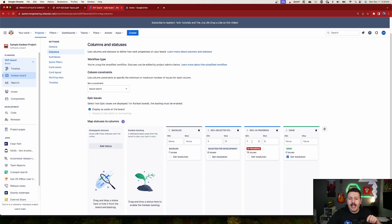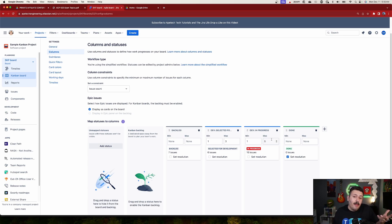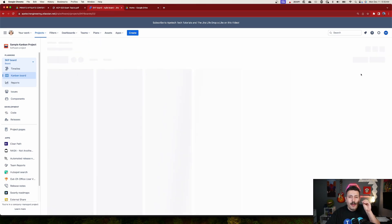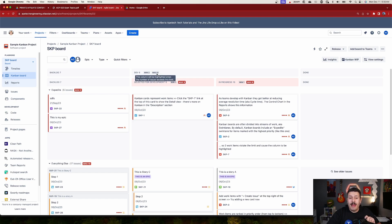The min and max for the two grouped columns now become a combined min and max. Before, three was the max for the 'Selected for Development' column and five for 'In Progress.' Now together as my 'dev' columns, I can have eight combined. If I bump this up to six, we'll have a limit of nine. Back on the board, I now have a 'dev' header showing six total items, a combined min of two, and a max of nine — the correct combined reflection.